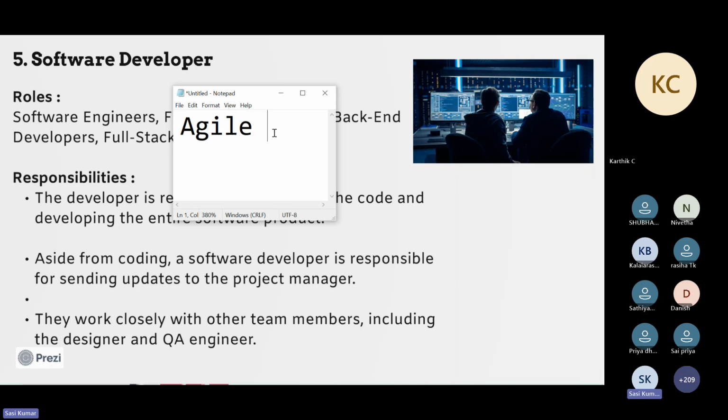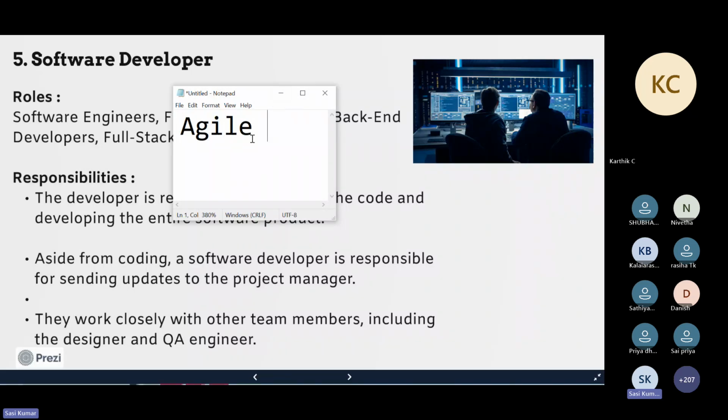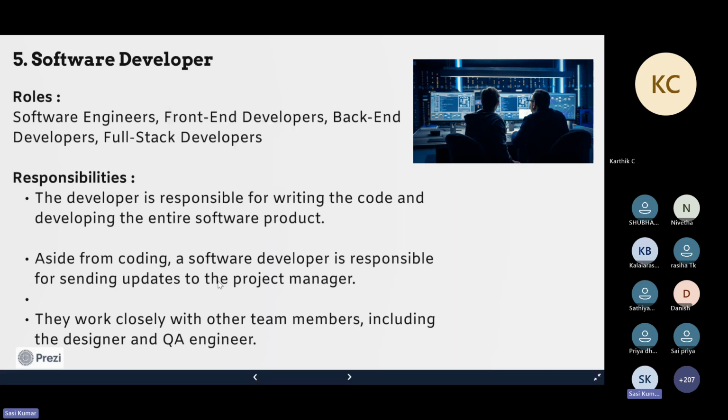It is a strategy that most of the companies are using. In our own companies over the past 13 years, we have had a daily team meeting, which they call the DSU, the daily status meeting. It is a stand up meeting, which means it should not be more than 15 or 20 minutes. Each team member updates what they did today, what they are working on, and what they are going to work on tomorrow. They update the scrum master in the DSU about their daily progress, right?